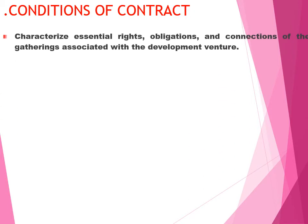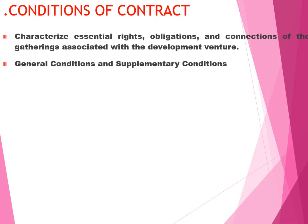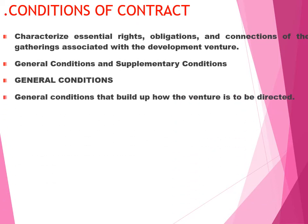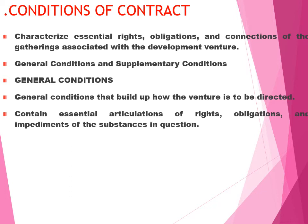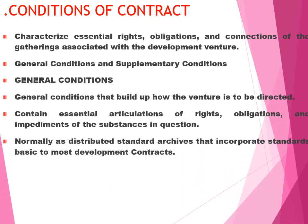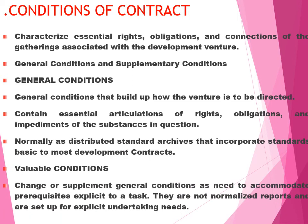Conditions of the contract explain the essential rights, obligations, and connections of the parties associated with the development venture. These include general conditions and supplementary conditions. General conditions establish how the venture is to be conducted, containing essential statements of rights, obligations, implementations, and substantials. Supplementary conditions change or supplement general conditions as needed to accommodate specific expedited tasks, and are not normalized reports.